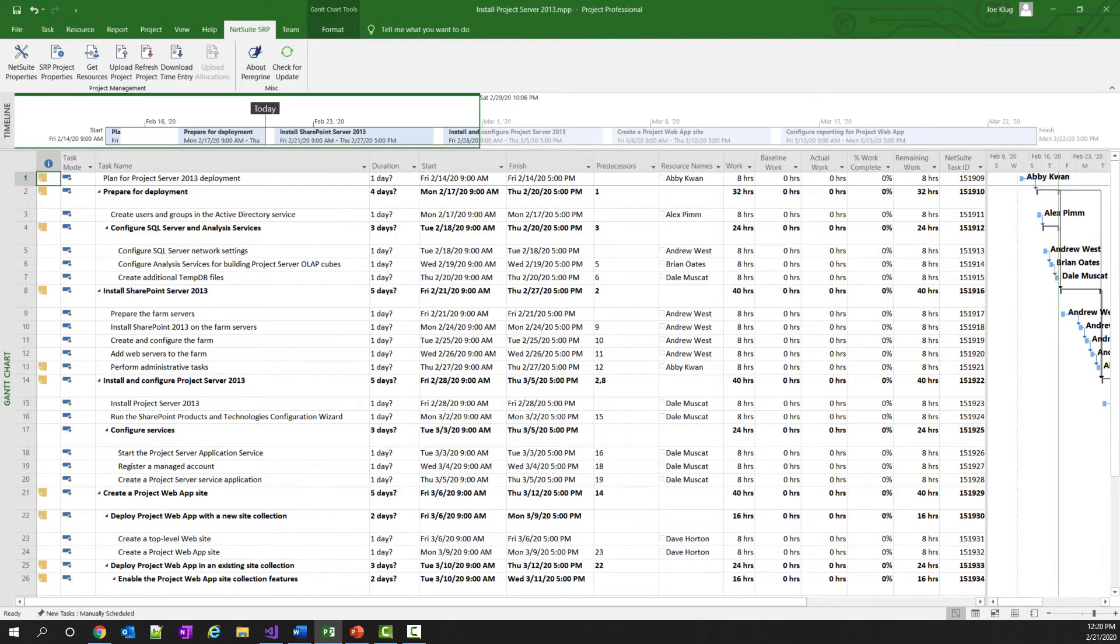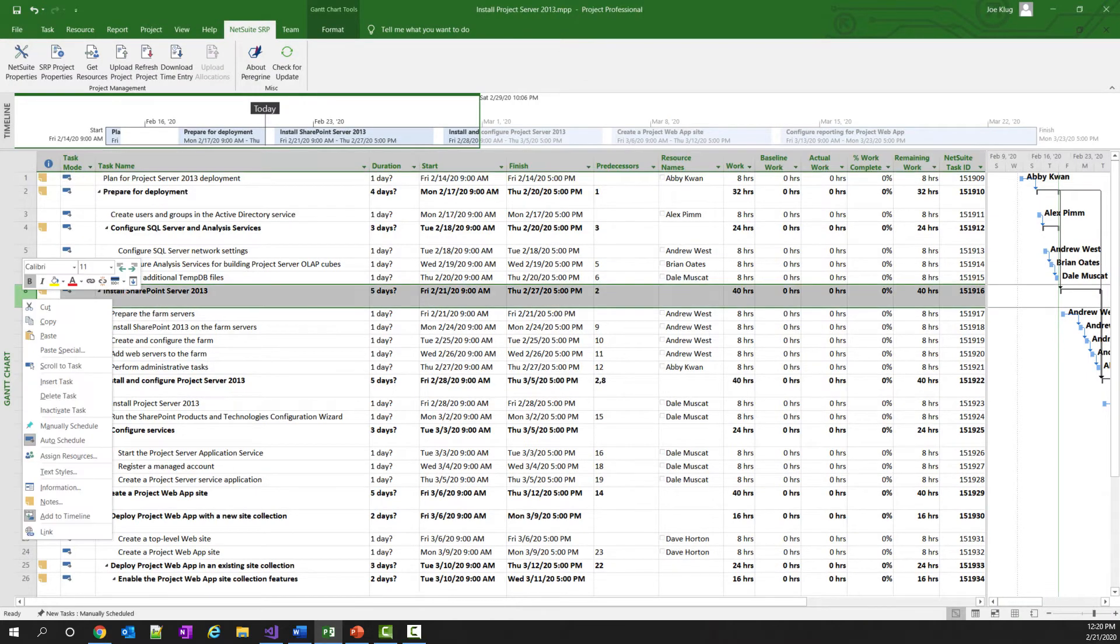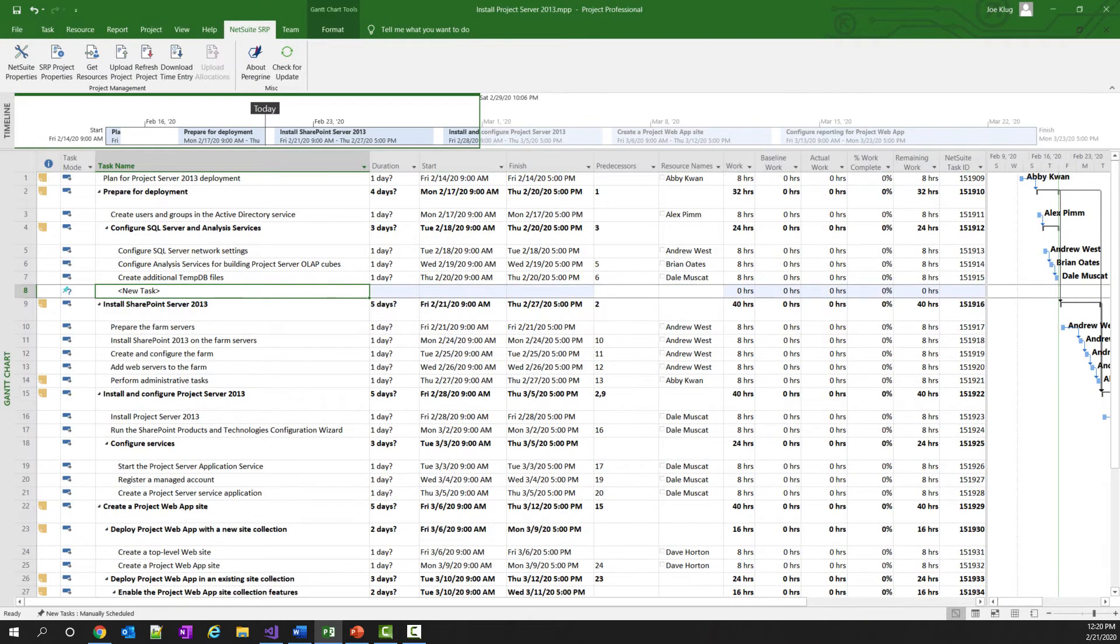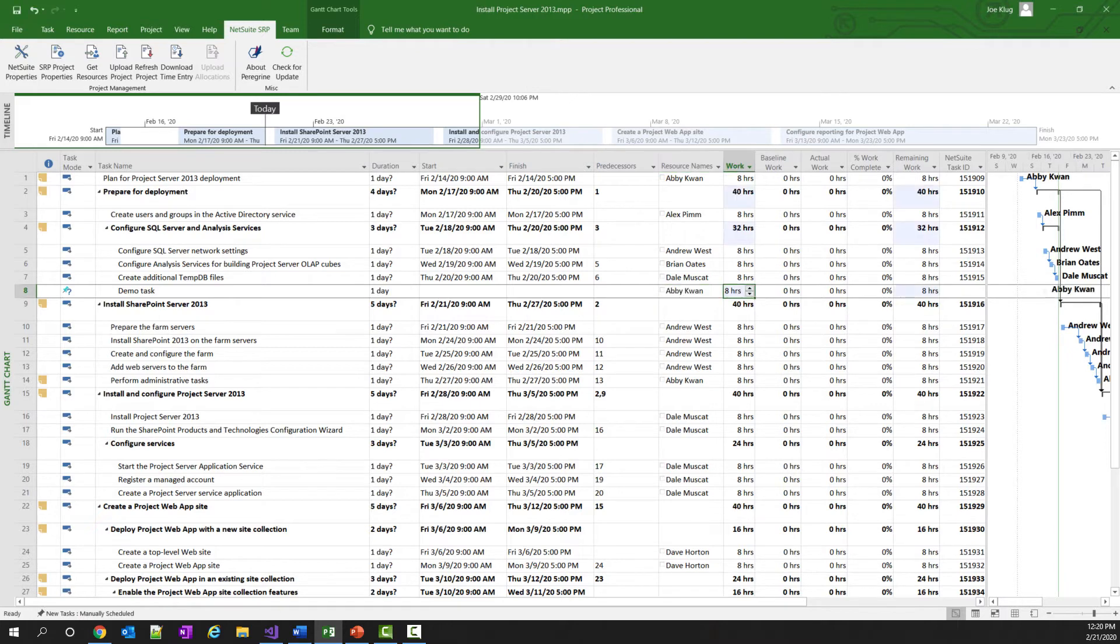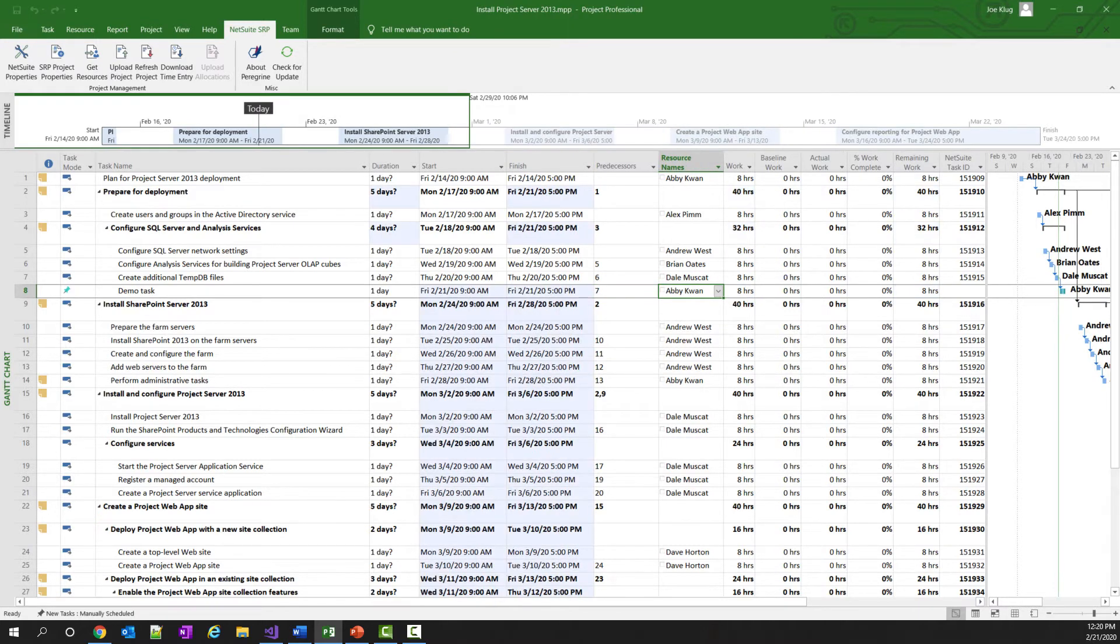I'll insert a task here, insert task, we'll just call it a demo task. I'll set the duration to a day, which will give us eight hours of time, and I'll assign it to Abby. So I've got this new task here, and I'll even put a predecessor in here for task 7 to make sure everything lines up.